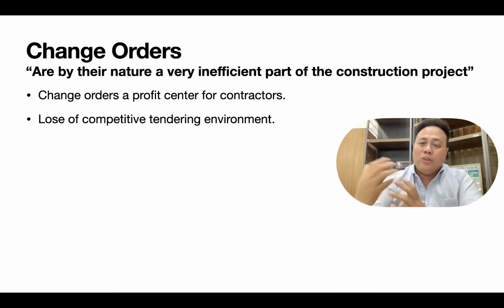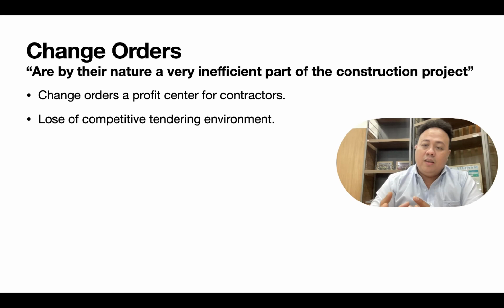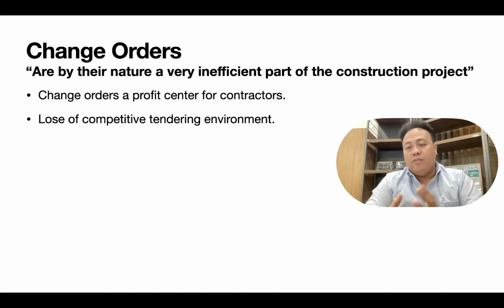And maybe the costing will be higher because, for example, they submitted a cost for the original contract 2 years ago, then you change the design 1 year later. So there will be inflation, and it will have a serious effect on the project budget and finance.